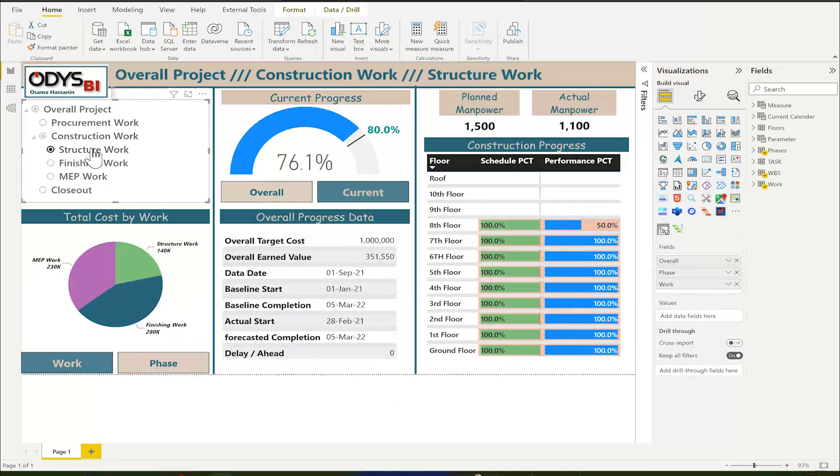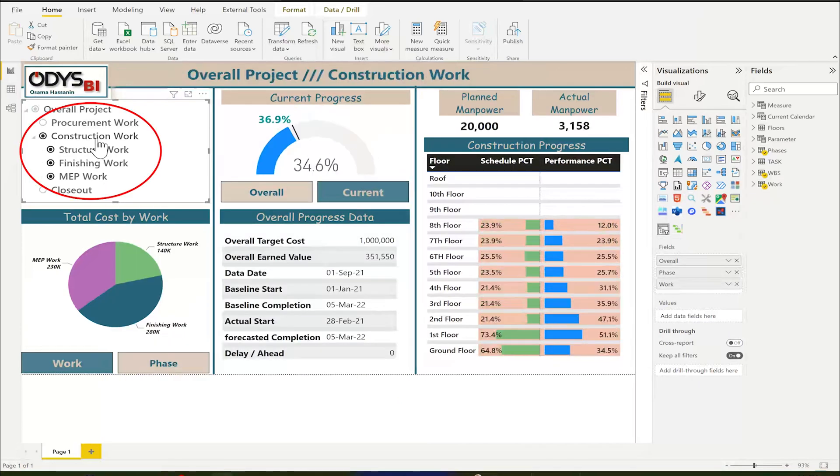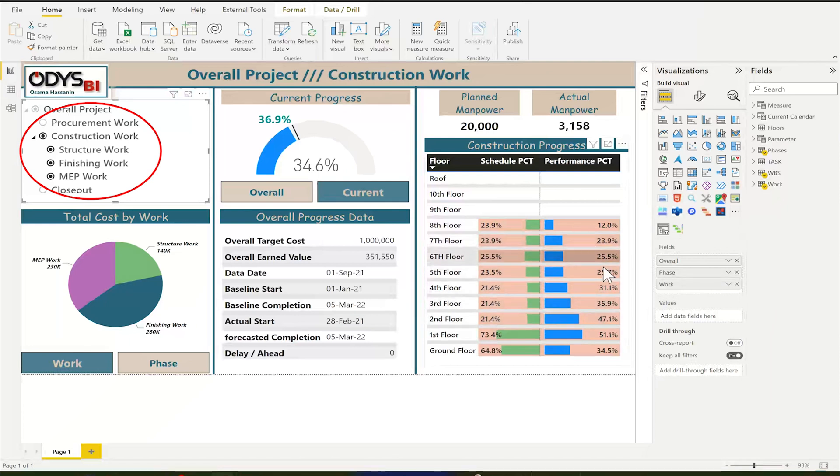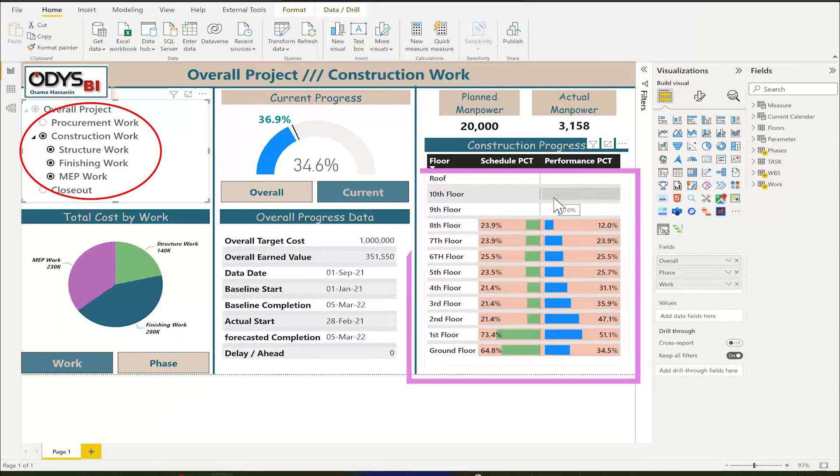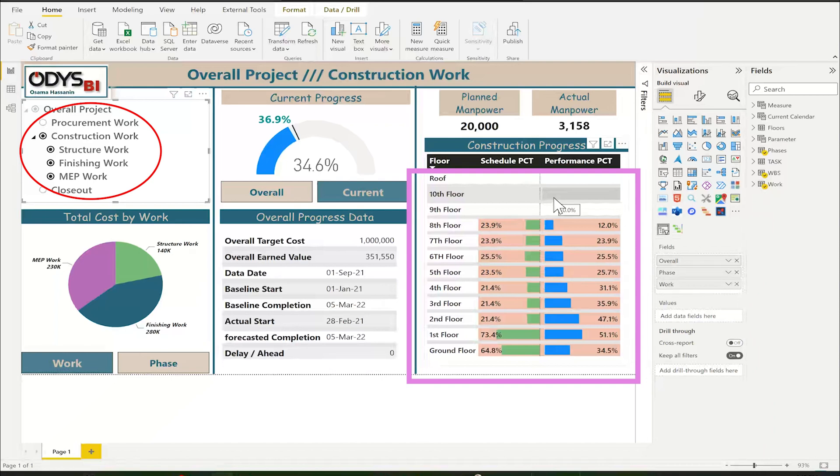I have here additional progress for the overall construction per floor. If you want to make it by Primavera, you can't depend on the WPS. You should define the floor by their activity, by user-defined, or by activity codes.